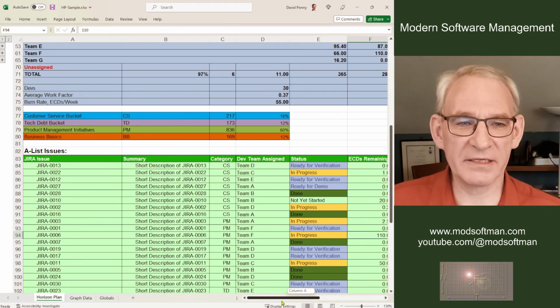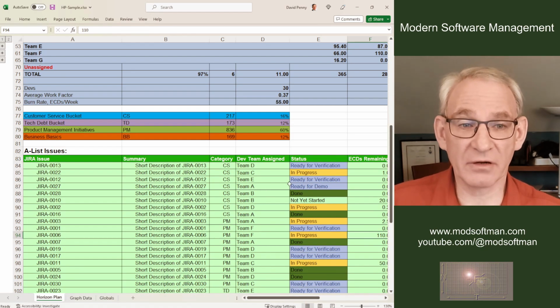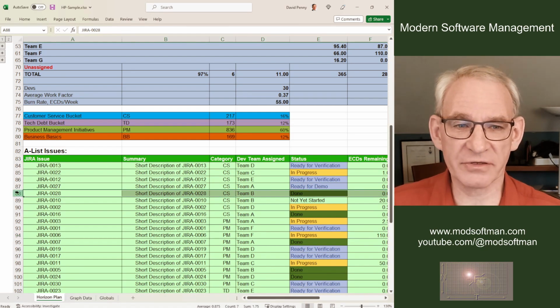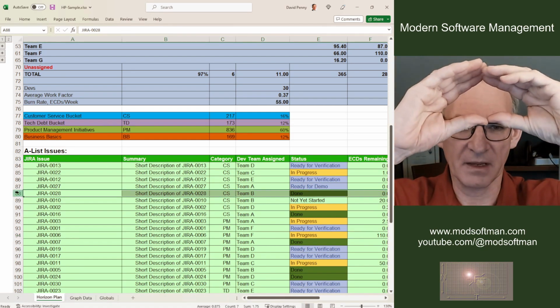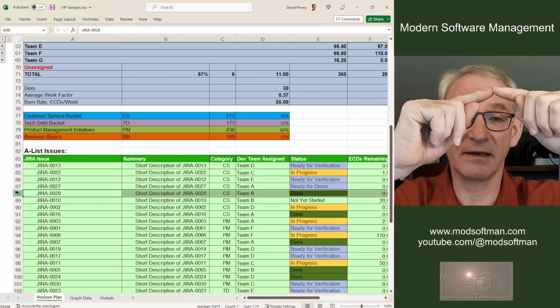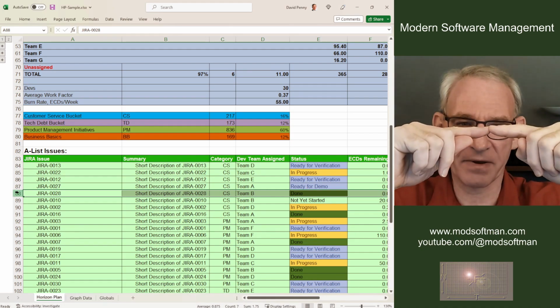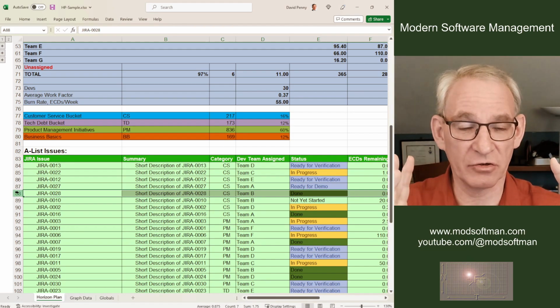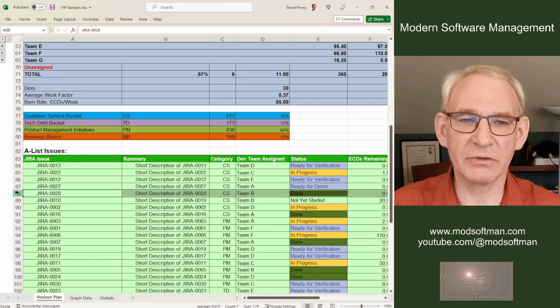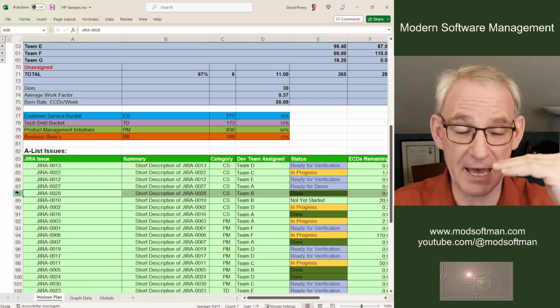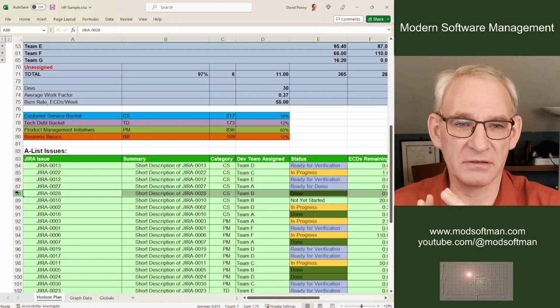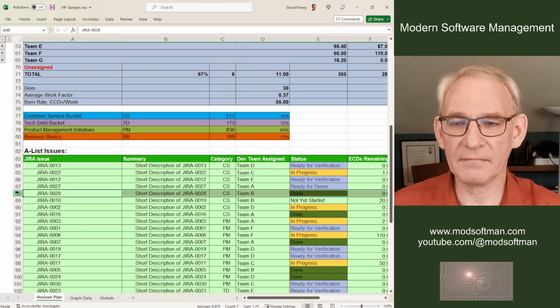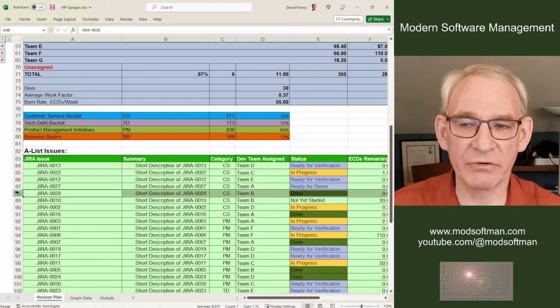So you say, oh, well, wait, these are too big for stories. Yeah, they're not stories. We call them features. So they sit at the top of Jira. There's features. We then have, I think, goals and epics and stories and potentially tasks underneath that. So this is grouping. Generally, we don't use goals so much. We use features into epics, and epics are divided into stories. And some teams use tasks and some teams don't use tasks.